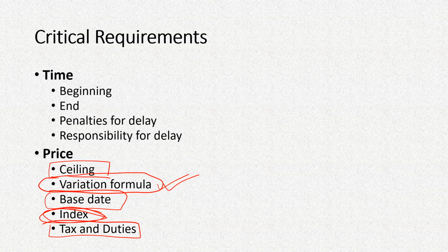Sometimes, almost always, in institutional funded projects, when you pay the bill to the contractor, generally some amount of tax is already deducted from the bill, and if at the end some remaining tax is to be paid, then the contractor will file for income tax separately by himself.